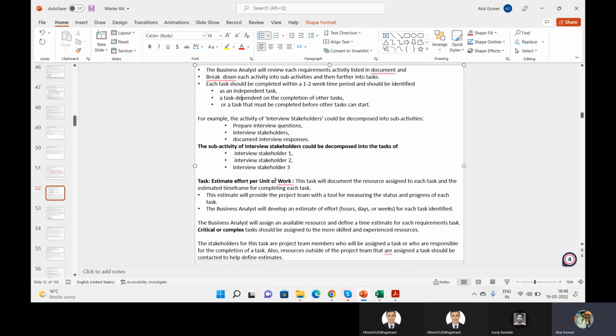How much validation does the customer want on this particular catalog item? Same: 1 to 5, or 1 to 2, or 1 to 3, simple; 3 to 5, medium; 5 to 10, complex. How many tables need to be used to build these validations? On the basis of that, I put an effort estimate, guys, that this particular catalog item request will be completed in this many man hours. It comes to 40, 50, 70, 80 like this.